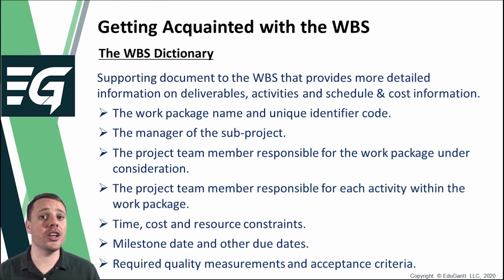During the initial scope management processes, the WBS dictionary will typically only include information such as the responsible team members, the required deliverables, required inputs, and so forth. In other words, everything that is known at that point in time. Once the scope planning process has gone through the first iteration, the time and schedule planning activities will be conducted, during which information pertaining to the activities and their associated cost and time metrics will be determined, and the information will be added to the relevant WBS dictionary entries in successive scope planning activity iterations.